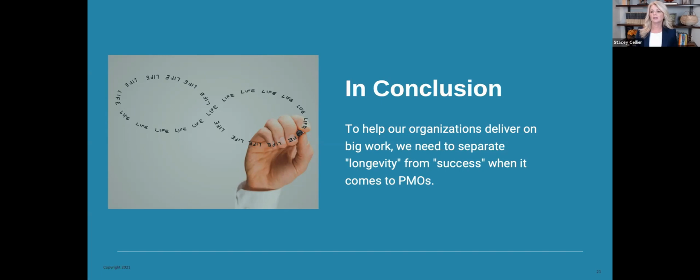I think again it depends on the initiative. For a PMO startup, I would say keep that shorter, in the 18 months or so period. What you're doing there is really cleanup. You are doing some of that triaging, and then you're starting to stabilize, and then you can really assess what we really need. If you try to do that while there are still fires burning, it makes it really hard to figure out what we really need. And you get running down a path that may not be the right level of PMO for the organization. The others, I think, run with the life cycle of the activity.